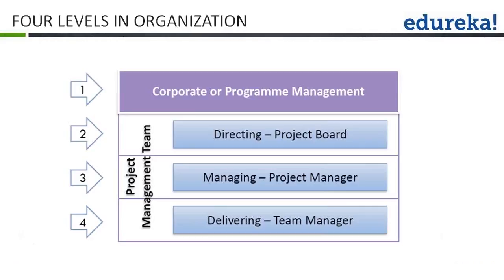The directing level is responsible for setting the overall direction of the project and leading the project. The managing level is responsible for day-to-day management of the project, and the delivering level is responsible for delivering the project's deliverables or products.